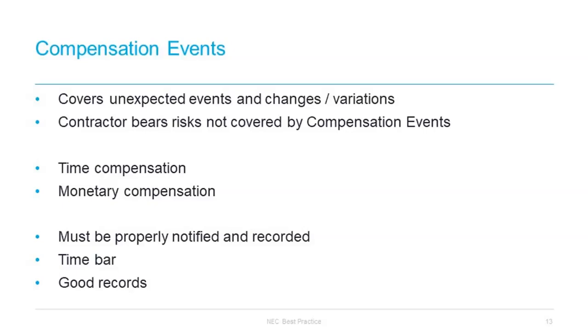If the compensation event alters the program, this should also be included in a quotation. Now, in those circumstances, the contractor has got to submit his quotation within 3 weeks of being asked, although again, that's the unamended version of NEC, and that time period can often be amended. The employer will then reply within 2 weeks, either requesting the submission of a revised quote, or accepting the quote, or a notice that no instruction or change is going to happen.